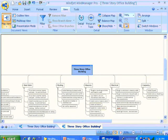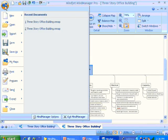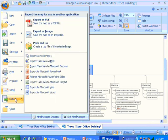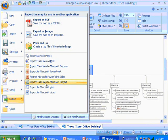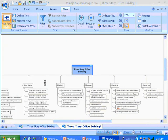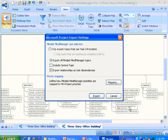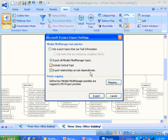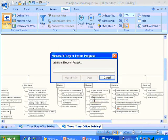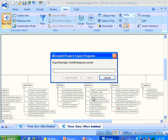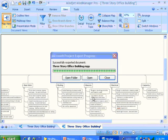If we click on this button called MindManager and we slide down to Export, you'll see we have the option to export task information to Microsoft Project. We click on that, save the file name, accept the defaults, and simply say Export. It then transfers that information across.